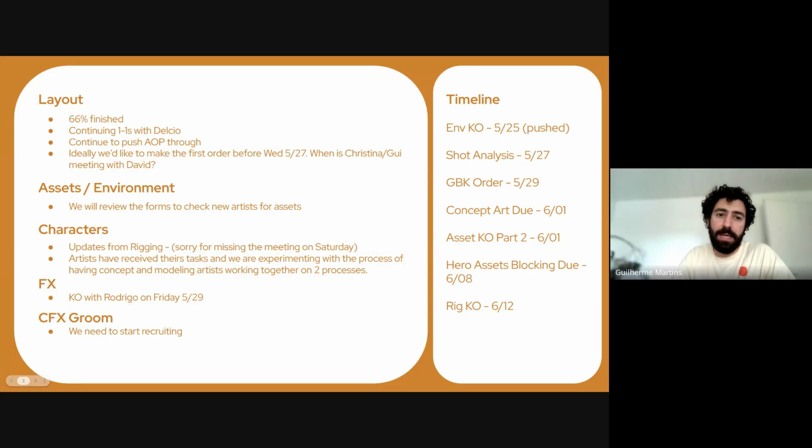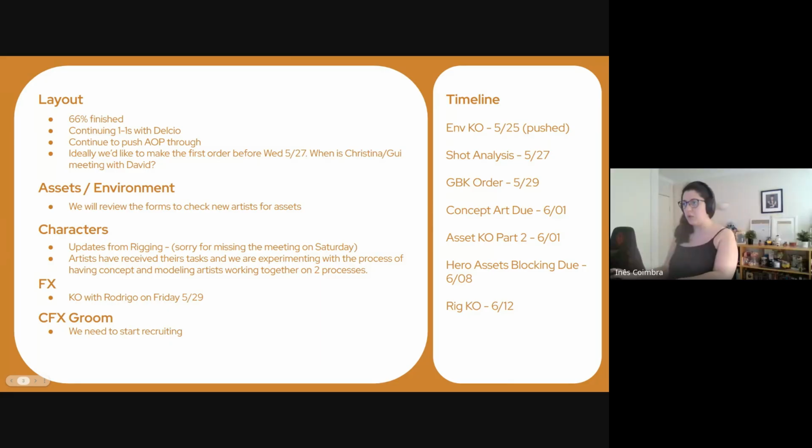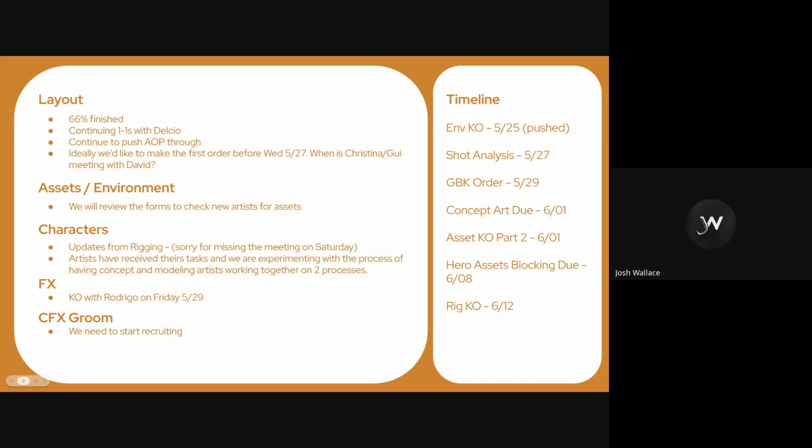Just so you guys are aware, my idea is to have at least one senior responsible for each sequence, and from then on we can split it out between mid and junior. Having one person who is the assignee of that sequence is my idea. Right now, Andrew is definitely not on Notion, so please ask him to fill out the form so that we have his data, and then Christine can put him there. Cool, I'll send him a message on our little group with him. Thank you, awesome.